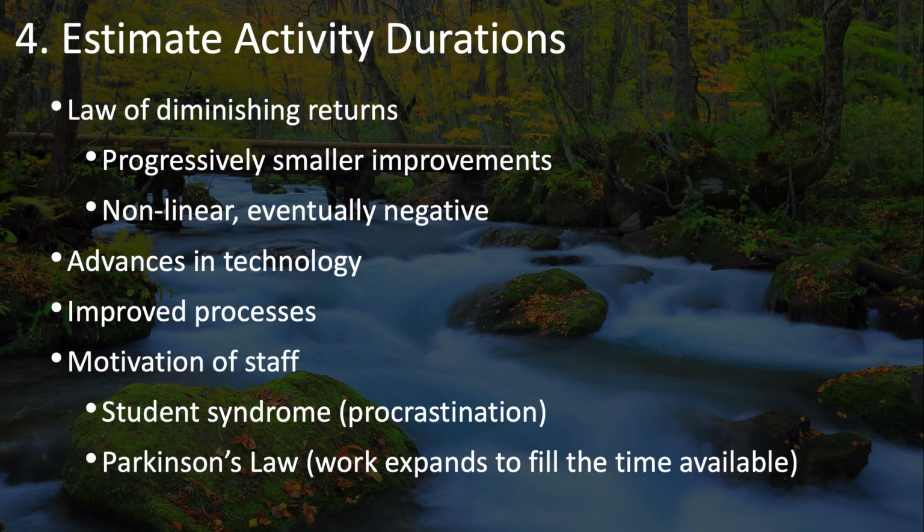If you find that you're getting blocked on activities a lot, it may be that what you need to do is break down these activities into smaller pieces so that you can accomplish parts of them and mark them done and get them finished, rather than having them put on hold all the time. As a project manager, you can have a huge effect in managing and preventing these kinds of problems by scheduling your project appropriately.